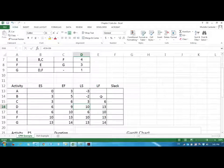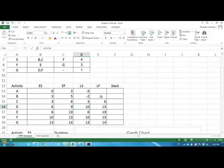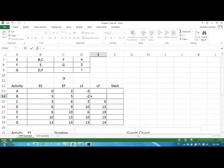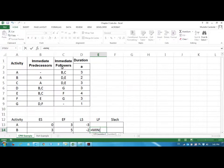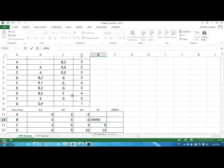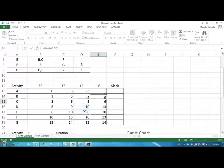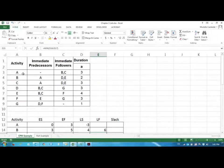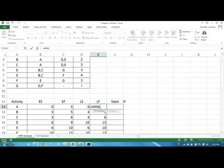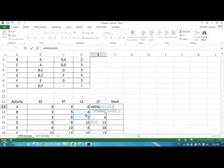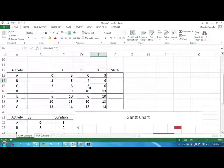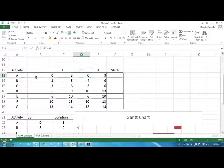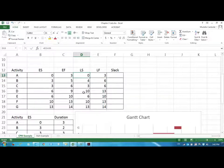So C has to be done by 6 even though D can start as late as 10. So if you have some difficulty understanding this please refer to the textbook. And late finish of B would be also the minimum of D and E. And the late finish of A would be the minimum of B and C.